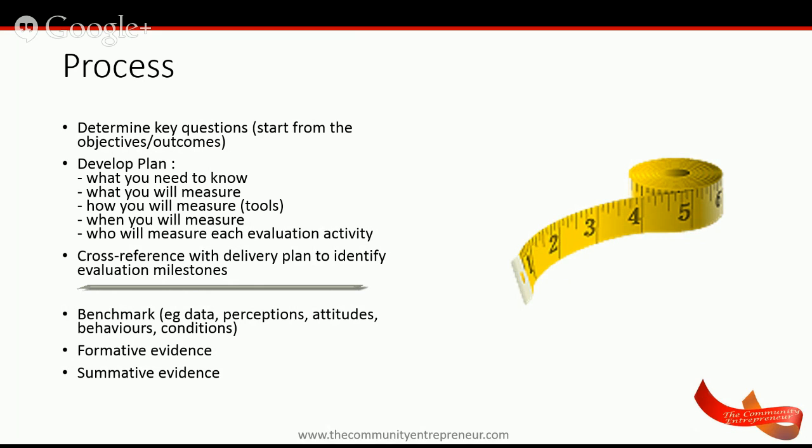So when you measure that, as I said, we can talk about the beginning and different times in the project, and activities that you're going to deliver during the project. You'll be able to say, okay, we're going to have a youth band or something happening at this point, so let's do something here. So you can actually tie up the kind of research that you want to do with the activities that are happening in the course of your project. So you're not trying to do an evaluation at odds with what's going on at the time. You want to take the opportunity to match everything with what's happening.